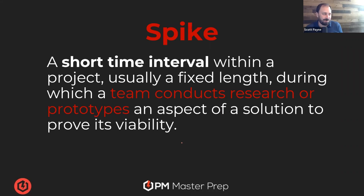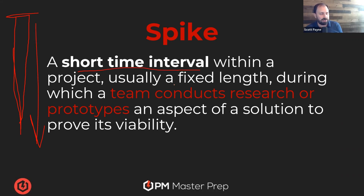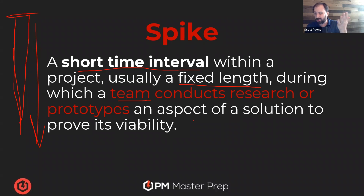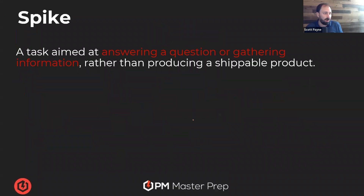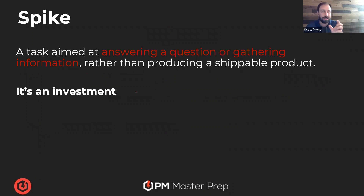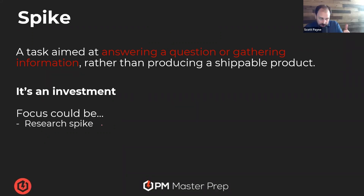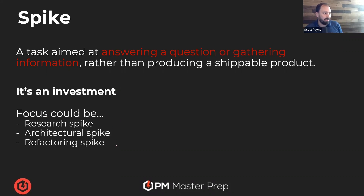So spike — it's like a railroad spike. It's a short time interval within a project, usually a fixed length — like take four hours, let's do this. During which a team or team member conducts research or creates a prototype on an aspect of a solution to prove its viability. In plain English that means: we don't know how to do this, we don't know what it will look like — figure it out. Don't take forever, take like four hours. Do a little research trip and tell us what you find. It's an investment of time. We're making an assertion to do it during a sprint: we're not going to actually build the thing, we're going to learn about the thing — to research something, to understand the architecture needed to build something, or to refactor. Refactor is to take a solution and make it simpler.